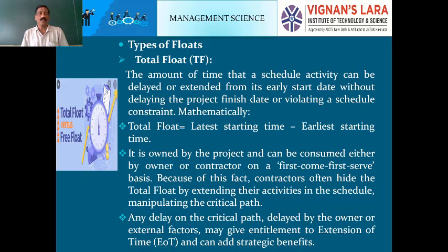That is, it is owned by the project and can be consumed either by the owner or the contractor on a first come first served basis. Because of this fact, contractors often hit the total float by extending their activities in the schedule, manipulating the critical path. This is a time delay with respect to the problem of the owner or contractor.